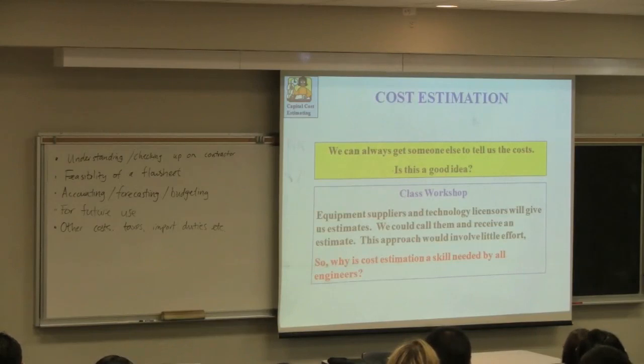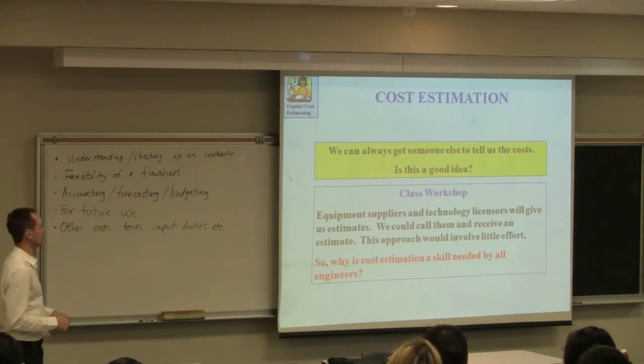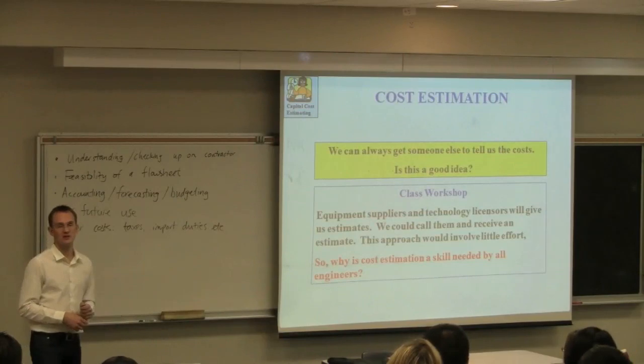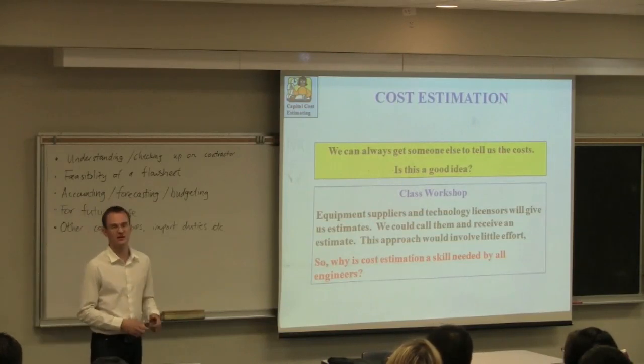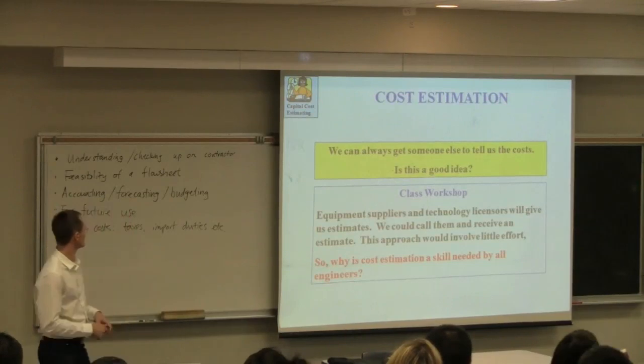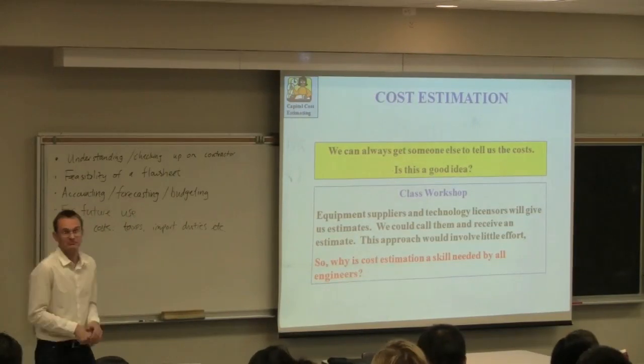Confidentiality is an important one. If you're producing a new flow sheet, the vendor's not just going to say, well, you want a heat exchanger, here's a cost. They're going to say, well, what's flowing through? What's coming from upstream? Temperatures, pressures. They're going to want to know a bit more information about the materials passing through to get you an estimate. And if that's a confidential flow sheet, you can be sure that vendor's going to be talking with your competitors in very short time after that. Despite NDA agreements. NDA agreements are almost never honored in the industry. It's true, I see it all the time.